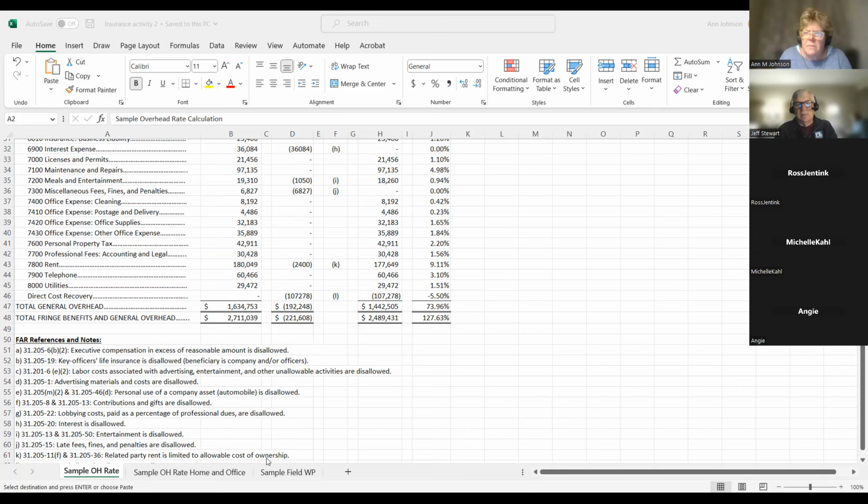So your fee that you charge your client, or MnDOT in this case, since we're talking about MnDOT, would be your direct labor times your overhead, and then you're allowed a certain percent of profit associated with that combined number. So for the $2.27, then you can add a percent profit, and the percent profit is determined usually by the project. And it ranges anywhere from, I think, 13 to 15%, or 9 to 15%, depending on what the computation is. Usually, if you have a very low overhead rate, they allow you to start at 13% profit, and up to a maximum of 15%.